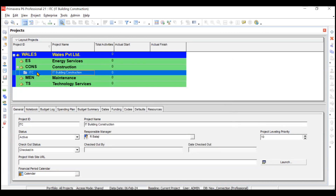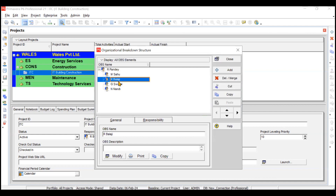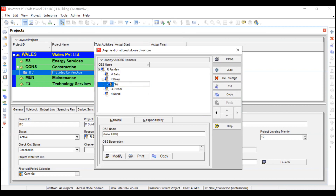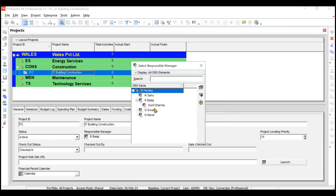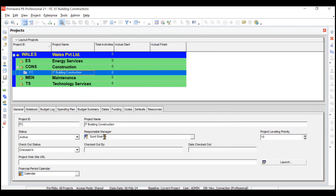The details have changed and a new project called IT Building Construction with project ID ITC has been created. Now we need to change the responsible manager to Sunil Sharma. We'll go to OBS, assign Sunil Sharma under R. Balaji, then click Close. From the Details tab, assign Sunil Sharma - the project is now given to Sunil Sharma. A project cannot be given to the head of a department; it must be headed by the project manager. R. Balaji monitors from headquarters, but the responsible manager will be Sunil Sharma.